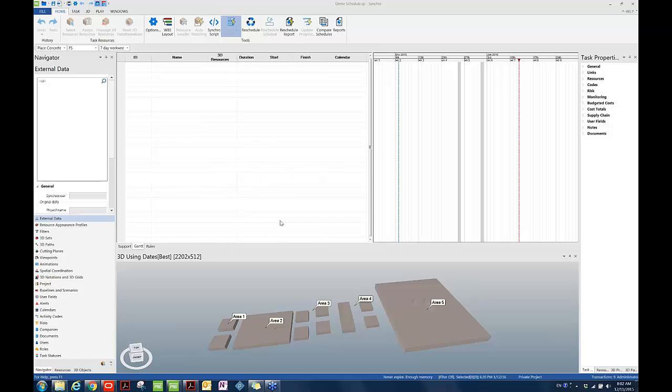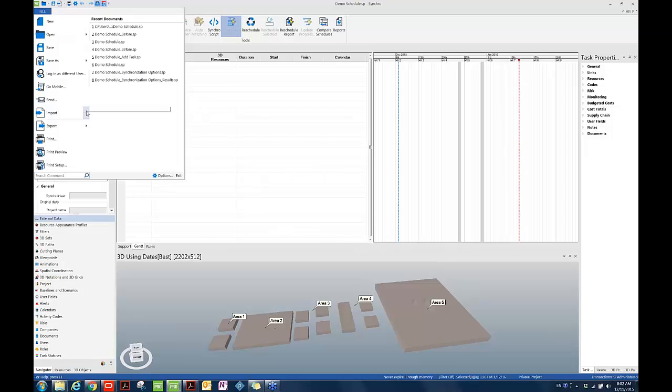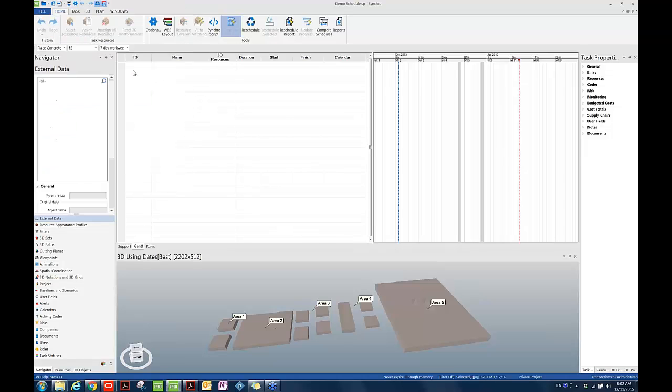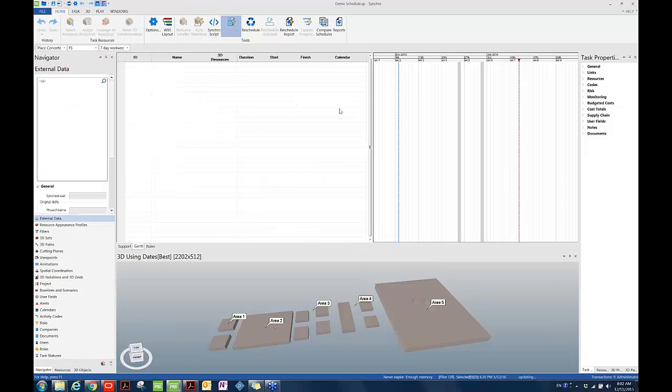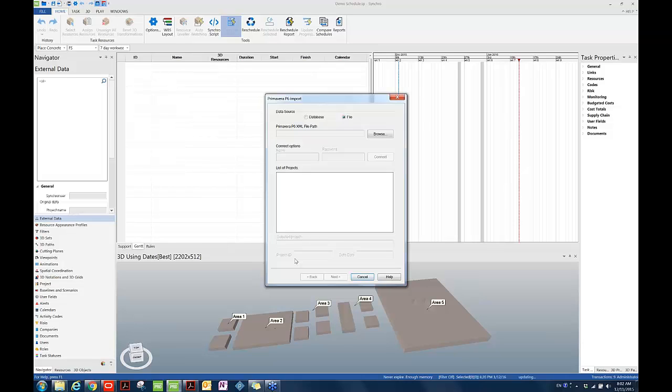A synchronization function requires that data has previously been exchanged with the Primavera project. Synchronization from Primavera P6 can be accomplished in two ways in Synchro right now. You can synchronize from a P6 XML file. The P6 XML file can be exported from any P6 database by anyone with access to P6. Synchro and P6 do not have to be installed on the same computer. No P6 API installation is necessary.